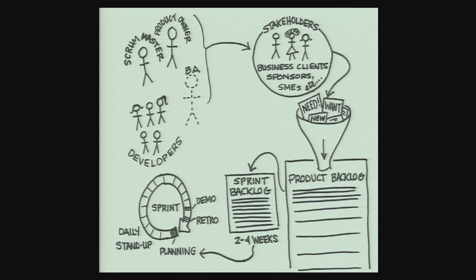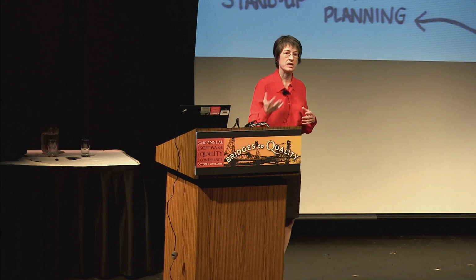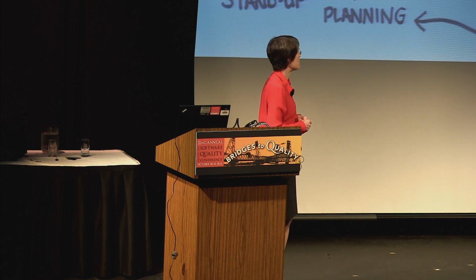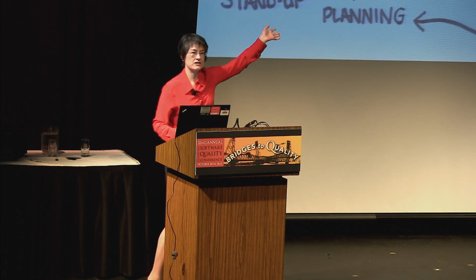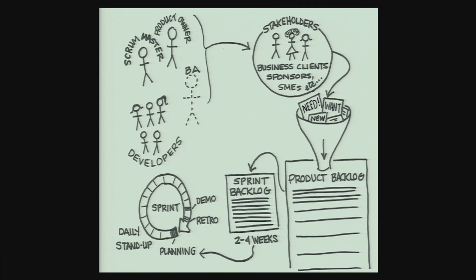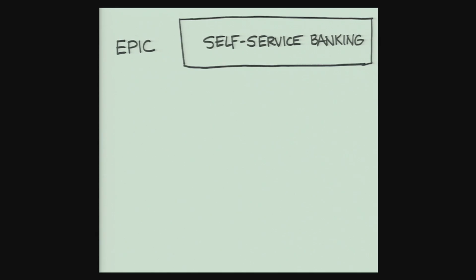And then during that sprint, you start with your planning day, and then you do a daily stand-up, and they work through it. You get to the end, you have something you can demo to your clients, and then you have a retrospective at the end of that sprint and say, what worked really well, what do we want to keep doing, what didn't work very well at all, and what do we want to change? Does that sound familiar to you guys? Yeah? Heads are nodding, good.